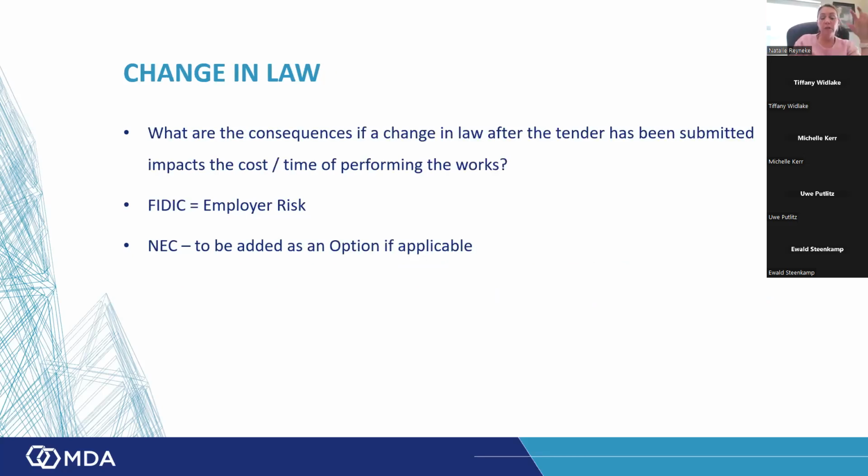And then obviously the change in law we spoke about earlier. I think this is also quite an important clause because this had an impact when the government declared the state of disaster. Some of the contracts actually enabled the contractors to claim time and cost as a result of the promulgation of that new legislation.